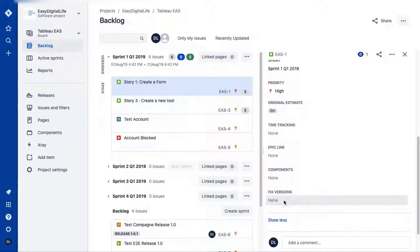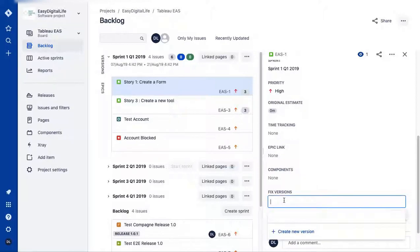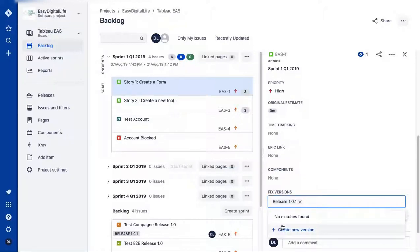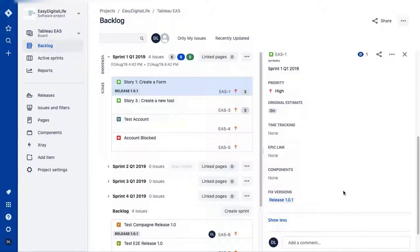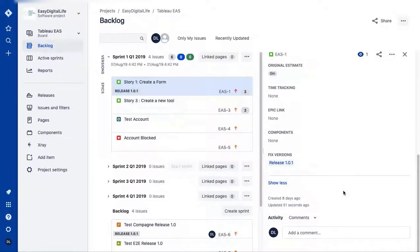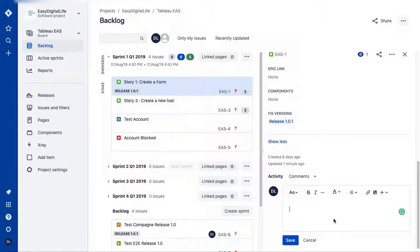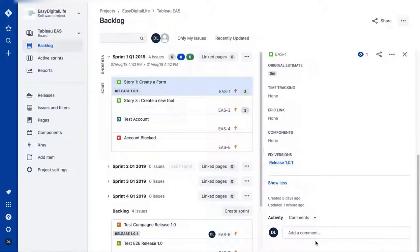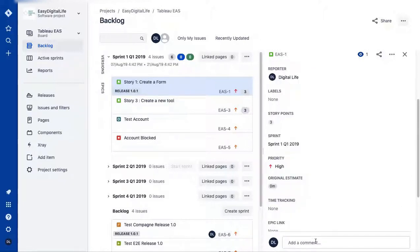One field I always use is 'Fixed Version,' which represents your release — when it's going to happen. This is really useful for managing and having visibility of your sprint and your releases. You can also add comments if you have questions or if a team member needs any additional information.